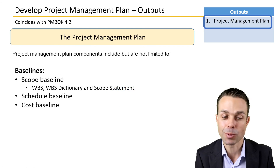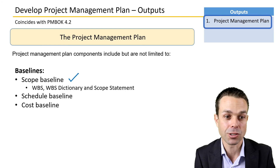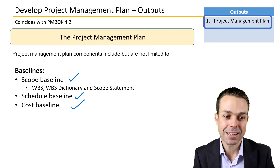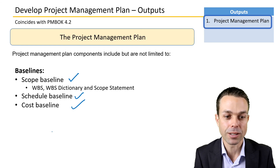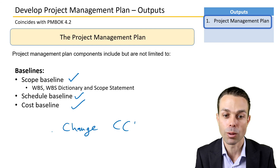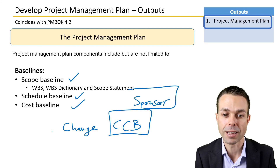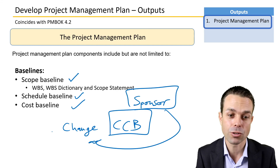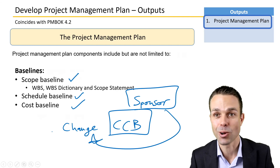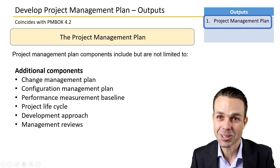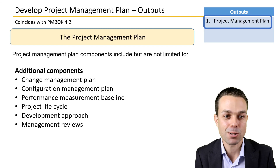You'll also have baseline documents. The scope baseline is locked at a point in time, as are the schedule and cost baselines. To make any changes going forward, you'll need to go through the change request process and the change control board, which is usually made up of the sponsor and a few other people who need to approve any change before it goes back into the baseline documents.